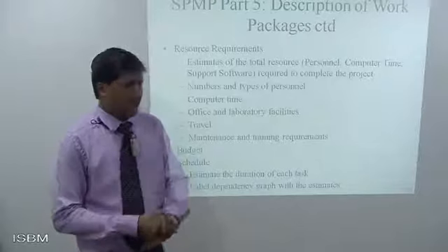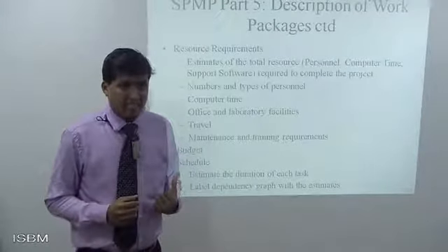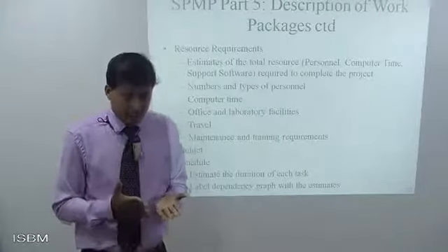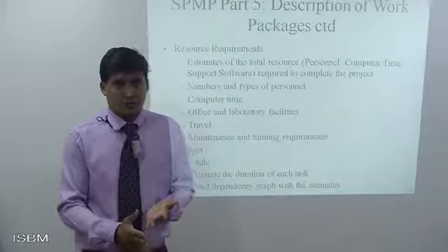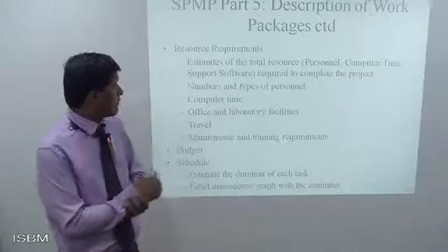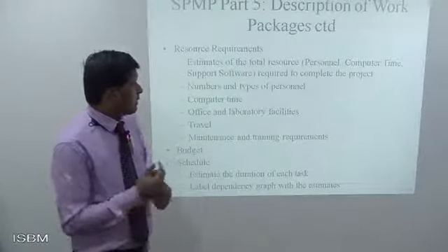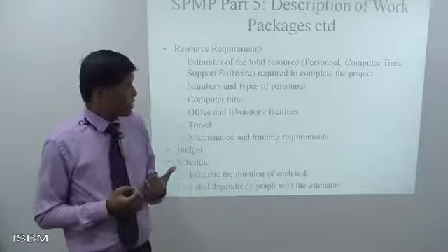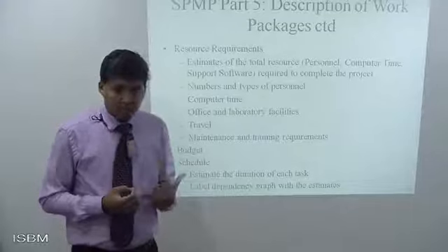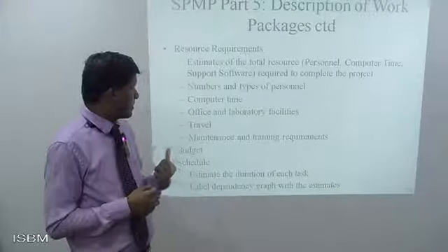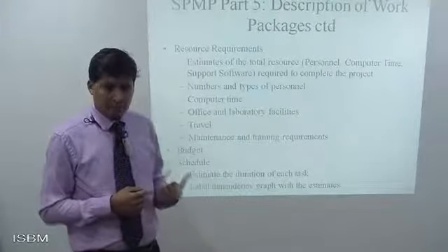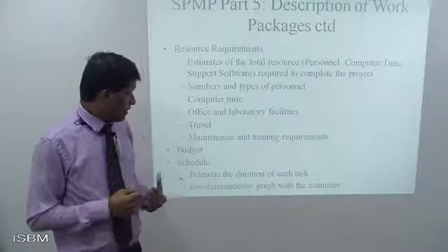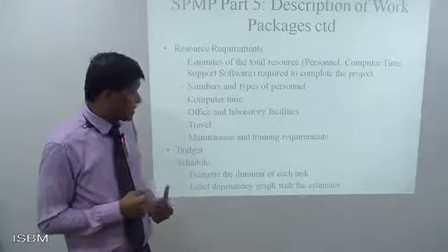Description of work packages. Now we mentioned and defined work packages earlier by saying that work packages are defined by specifications, and that's so critically important. For example, resources required: it estimates the total resource required to complete a project, numbers and type of personnel, computer time, office and laboratory facilities, travel, maintenance and training requirements, budget, schedule, estimate of duration of each task.